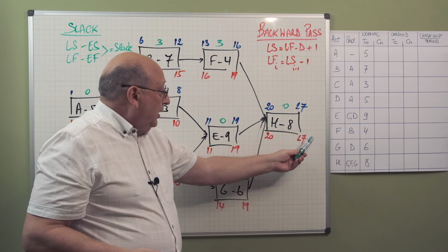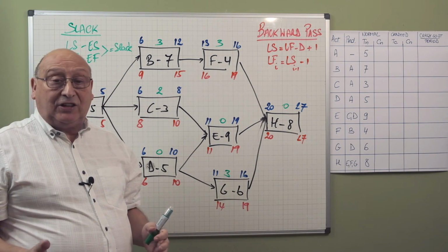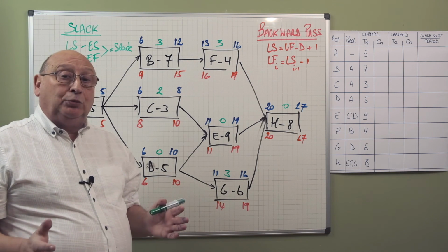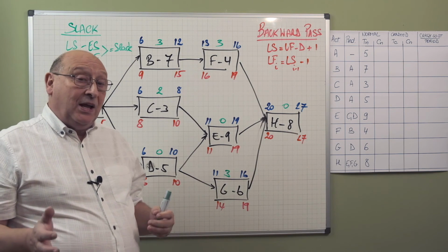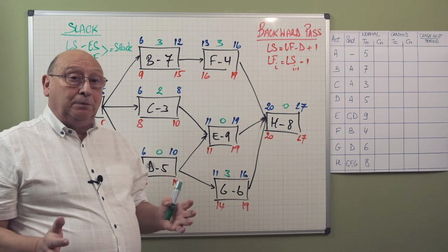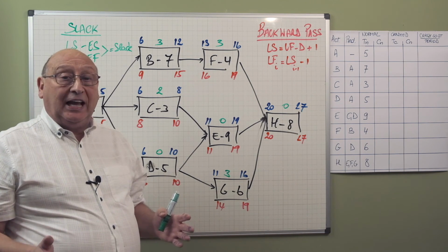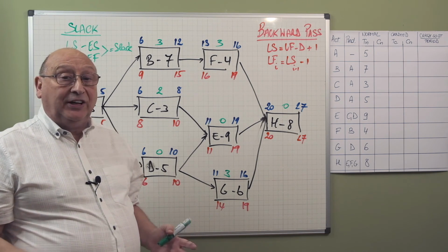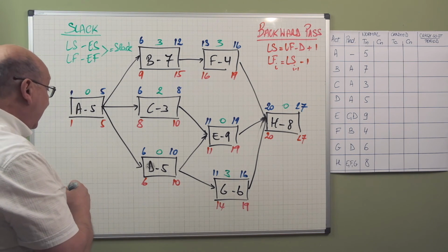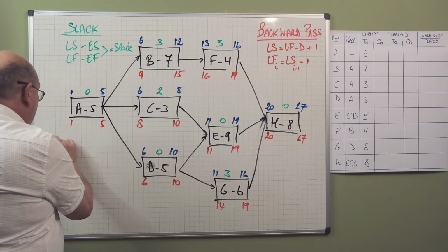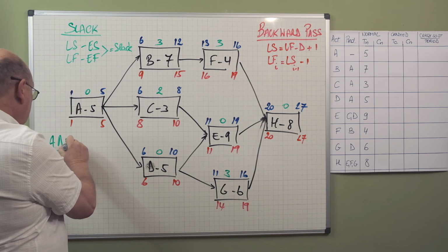If those two are not the same, then the critical path is given by the activities with the lowest slack, even when it's not equal to 0. Remember, there always has to be at least one critical path, and in the worst case, all paths can be critical.